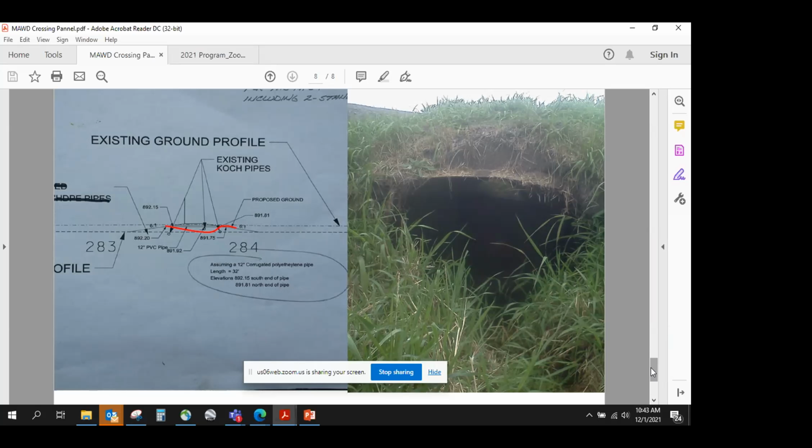At the time, we had some conversations. I had reached out to Al Kane at Bowser and talked through what are some of the options that we could pursue. Given that there was still flow allowable, we could fit a 12-inch pipe between these oil pipelines, but there was no way we could get it at the approved ditch elevation. And what we ended up doing was we spoke with the county about pursuing an impoundment under 103E.227.